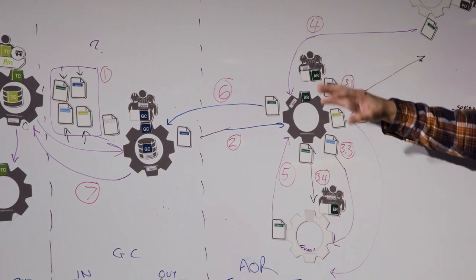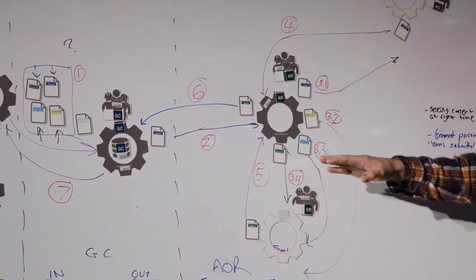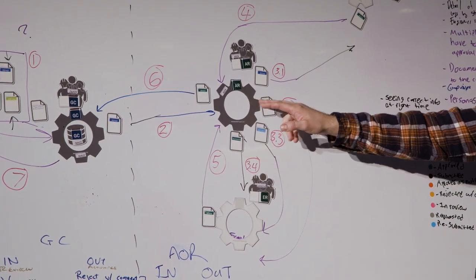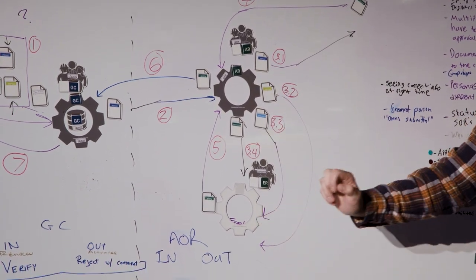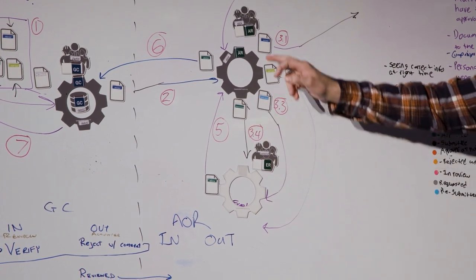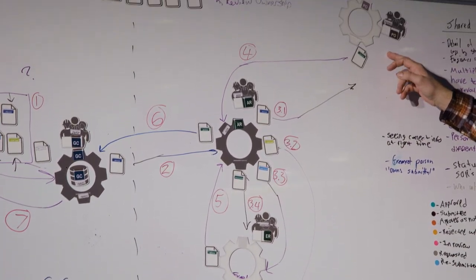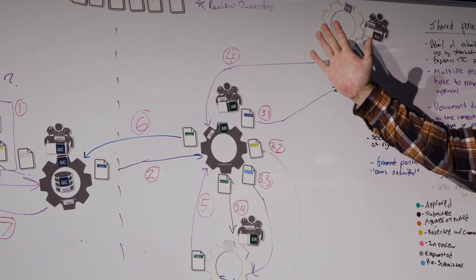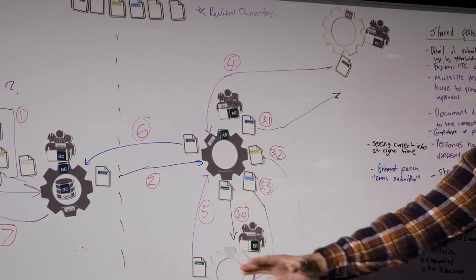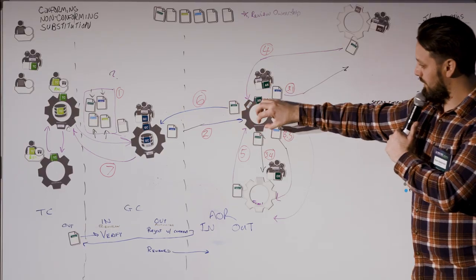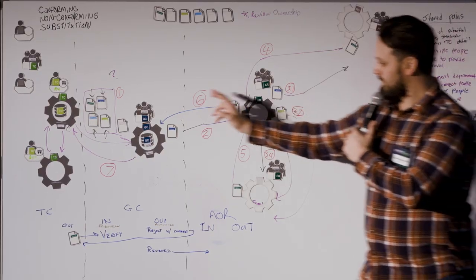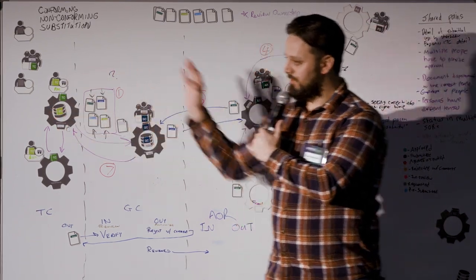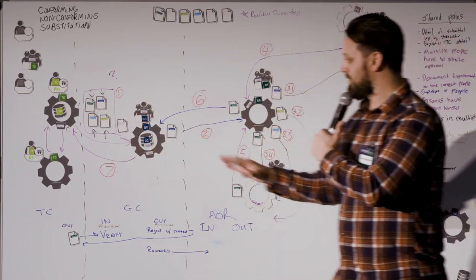The architect reviews it and has to disperse the information to where it needs to go. A shop drawing could go to an engineer, a data sheet to that same engineer, and the type of light fixture the owner wanted has to go for approval. Then all that information gets returned, accumulated back together, sent back to the GC, sent back to the trade contractor — and hope nothing gets changed or messed up in translation.